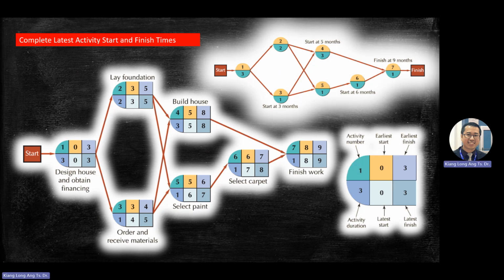Later I will put it on my side. I have a very nice sentence. I explain the method first so that you understand. All right. Method number 2, you look at the center column. Method number 2 is you check the network where this box is called earliest start. When your earliest start number is the same as your latest start, that is a critical path component.